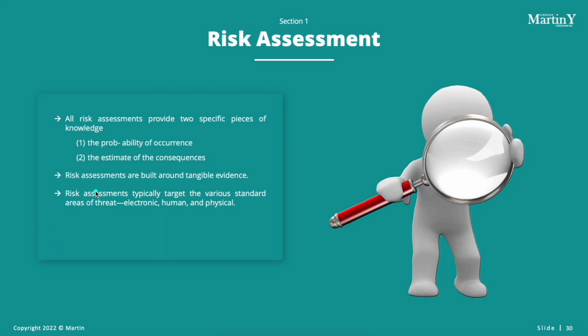So there is a logical sequence to how those two questions should be approached. Particularly speaking, for the first consideration, it has to be the likelihood, because a highly unlikely event might not be worth the cost of further consideration. However, it is the estimate of the consequences that truly shapes what to respond to and what can be left vulnerable.